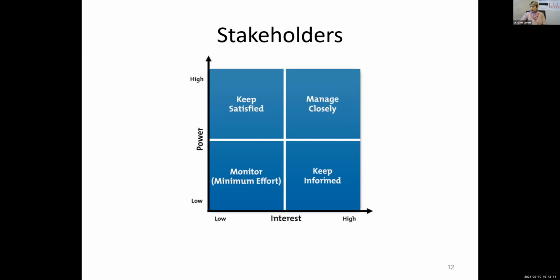That's in terms of low power, high interest. There's some middle level manager. They're really interested in the idea that you are working on. You're doing oxygen level management, the trend, and doing analysis on the safety of colonists. They really care about that. But in terms of doing the work for your project to help you get support, get money, they're not in that position. You still want to keep them informed, but you don't do more than that.